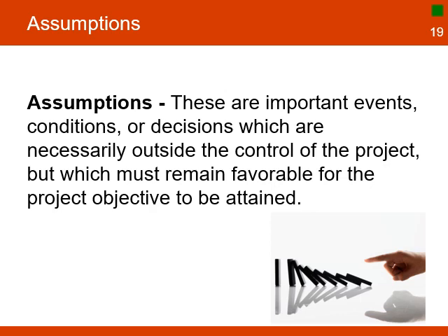During the implementation phase, the project team will need to review if the original assumptions are still valid or not. If an assumption has changed, they will need to review the project logic and understand the effect of the change in the objective. The team will need to make corrections or changes to the plans and implementation strategies. Assumptions at the activity level are much easier to manage than assumptions that change at the outcome level.